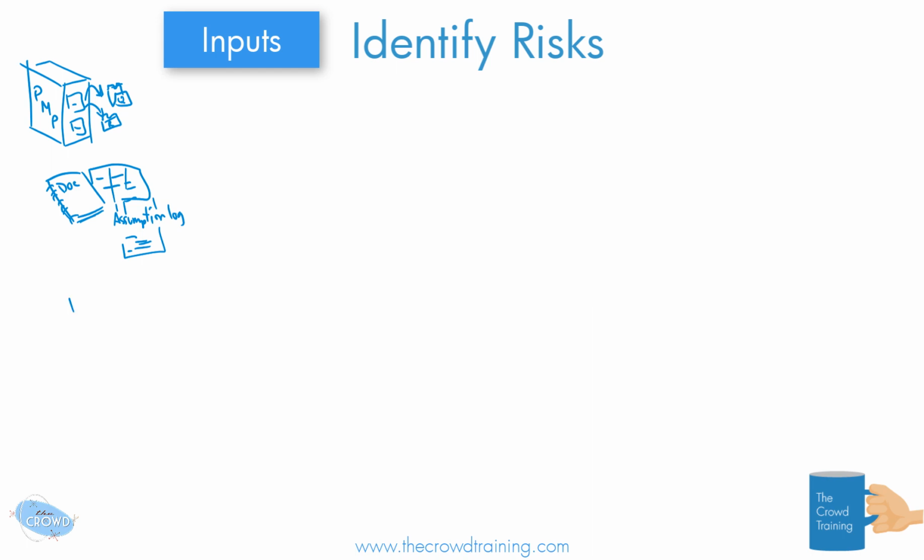Additionally, too, there are agreements. Maybe they are internal between different departments. Maybe they are between outside sources, like for instance, if we have a contract with a company to build roads, maybe that's with the city government, and the government says we got to meet by this date, and this, whatever, our people have agreed to, we're going to have to adhere to, and hence there could be risks inside that.